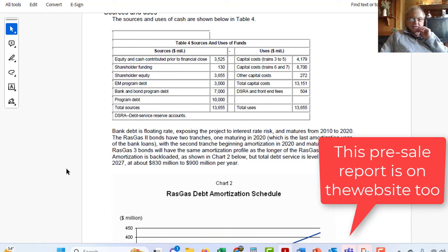And if you have a PPA agreement with a penalty, you charge some of the penalties in the O&M contract, you charge some of the penalties in the EPC contract. Like if the off-taker says if you're going to be late, you're going to have to pay a liquidated damage penalty, then it goes here. Same with the fuel contract. Everything is connected, and you can structure these contracts really carefully, but you have to make sure this off-taker is okay, and that's why Richard Tinsley made this diagram.